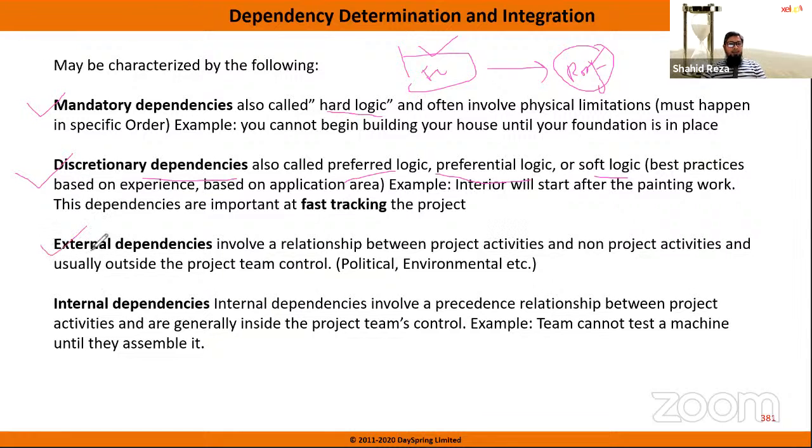Okay. External dependency. What is external dependency? That is something that does not depend upon your team. Say, government regulations. Today, I think everyone knows, was our last day of income tax submission. So whatever you do, you have to finish by today. So this is external dependency. Any government regulations or weather or climate change are external dependencies. As a project team, we cannot do anything.